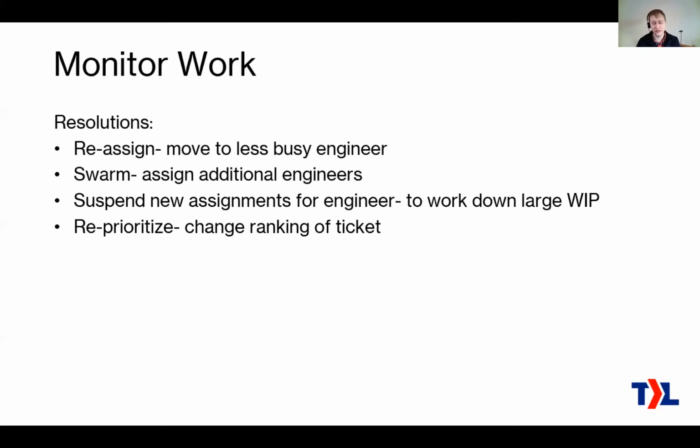Sometimes you just need to reprioritize the tickets, okay, especially for tickets that are sitting in the ready column. It could be that maybe a technician has gotten a bit delayed. They haven't been getting through the work in their ready column very quickly, or maybe the whole team hasn't. If you're using the team queue, that means that maybe there was a ticket that was kind of lower priority, but the queue hasn't been moving that fast lately, and so actually this ticket has a due date or whatever. It means you need to prioritize that higher, because it does need to get done sooner.